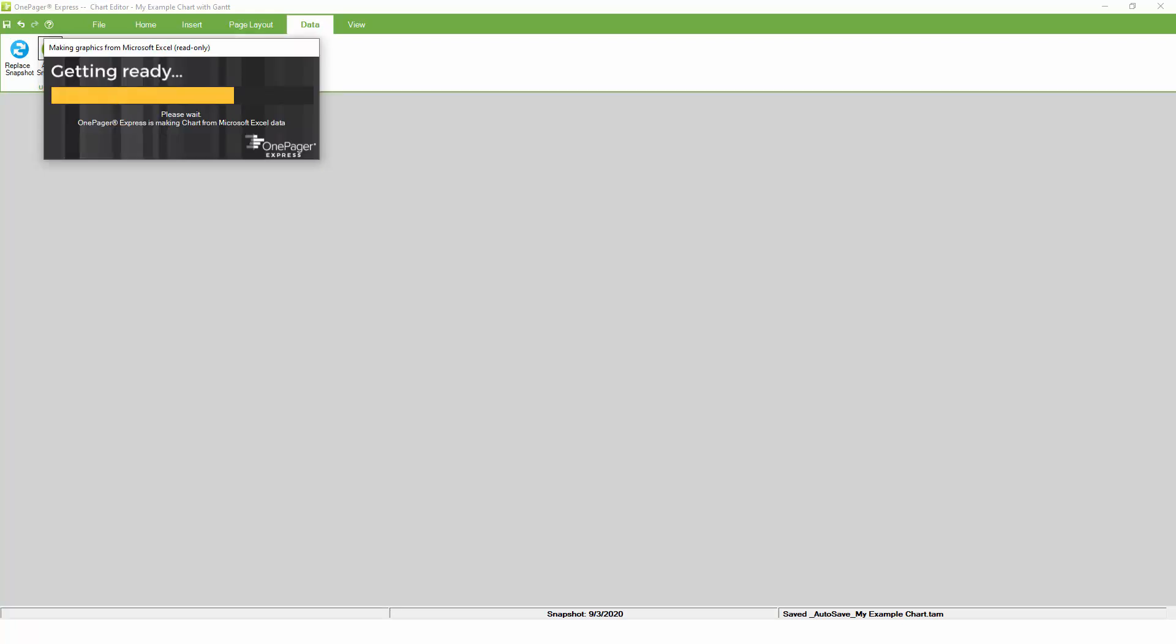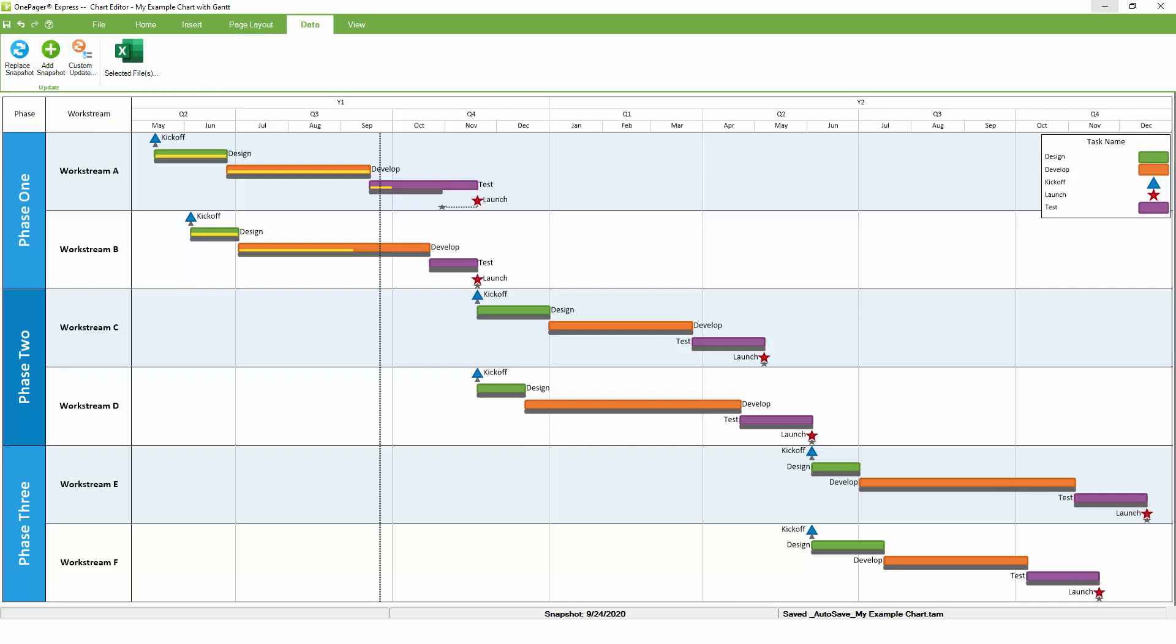Now in OnePager, we can click the add snapshot button and specify a second snapshot date three weeks from today. OnePager will go back to Excel and will re-import the newer version of the schedule, but instead of simply updating the chart as we did before, it will create a second snapshot in the same report, so we now have one version of the chart from today and one version three weeks from today.